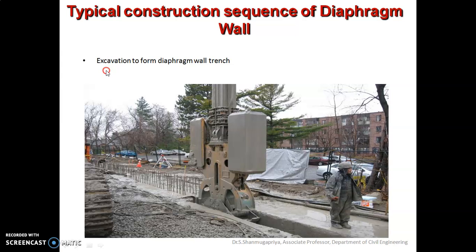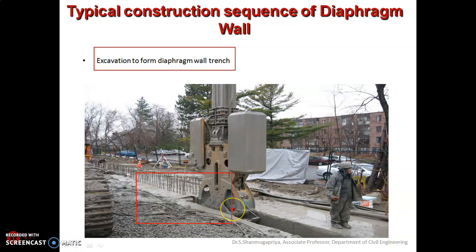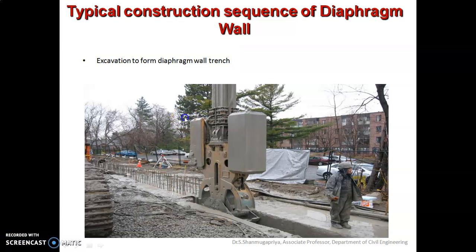In the second step you have to do the excavation to form the diaphragm wall trenches. Excavation is done using equipment called the clamshell. If the clamshell is not available, other equipment fitted with a hammer on a crane can be used. In cases where you come across boulders during excavation, gravity hammers should be used. This second step involves excavating to form the diaphragm wall trenches using equipment like the clamshell.